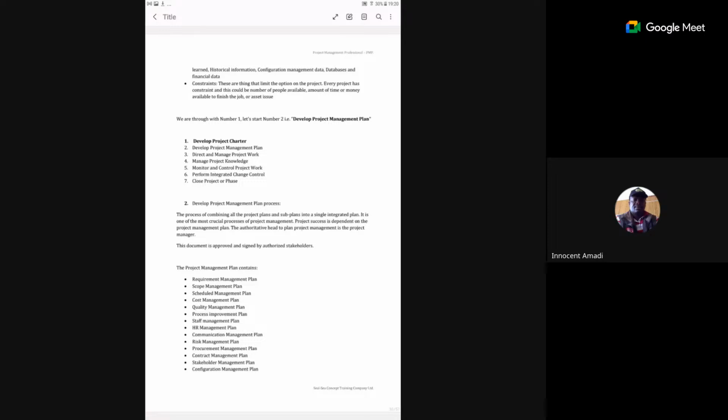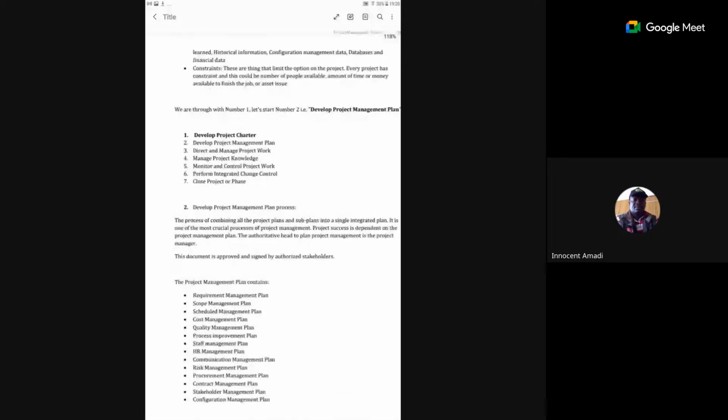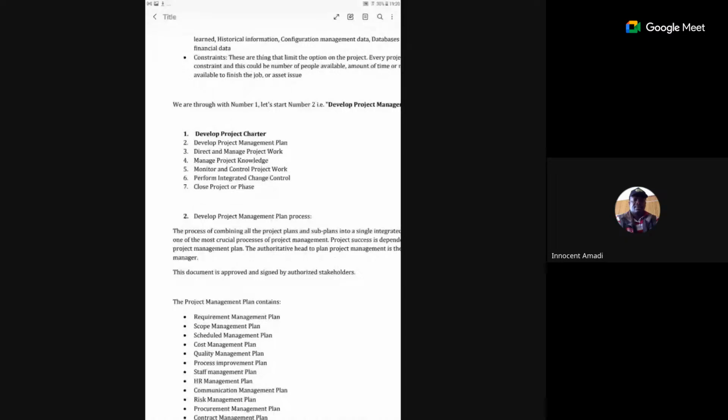We said under project charter, that is the document that will help you to initiate the commencement of a project. That's what we authorize somebody to be called a project manager. That's what will give us the brief description of your project. That's where we'll get to know if your project has a good business case, that is, it can actually meet up with business demand, or it will be profitable. So we do a whole lot under project charter, and what comes out of it is actually your project charter. Your project charter also introduces to you your stakeholders. It makes you to know the scope, it makes you to know the purpose of the project and all that.